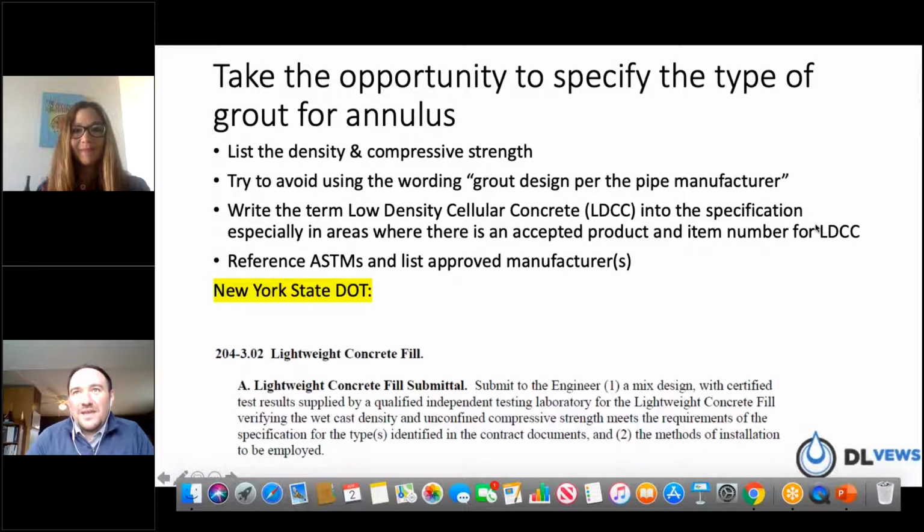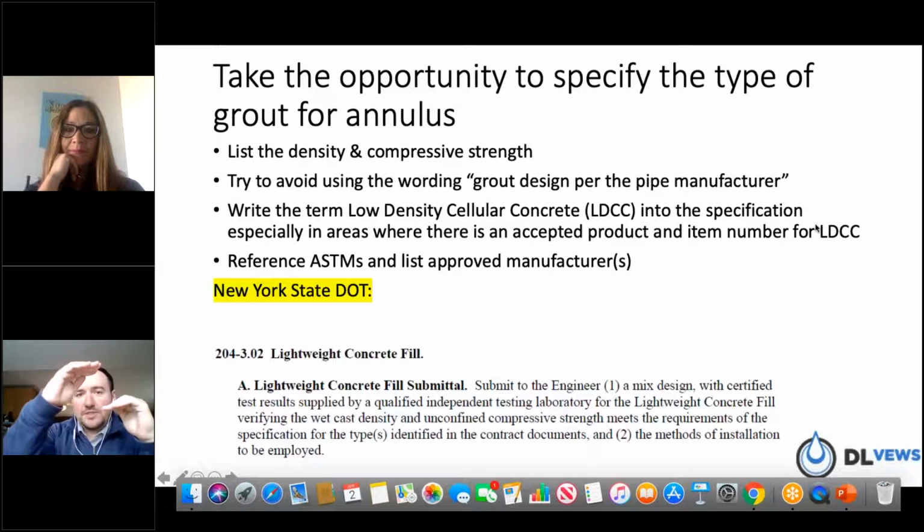So a lot of things go into pricing, and those include even regional pricing. But the one comment I can make that's a commonality, no matter where you are in this country, is if you start at 60 PCF, for example, and you're able to design with 30 instead of 60, you're helping that customer or that owner with the final price.